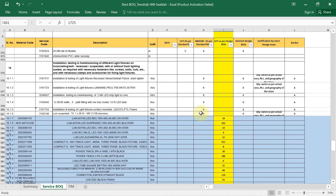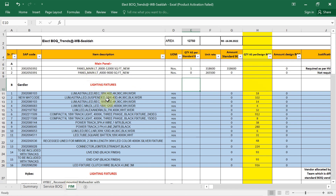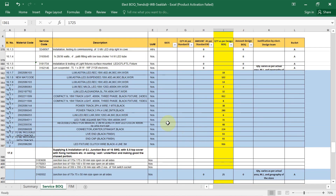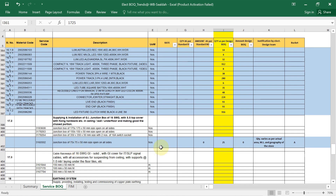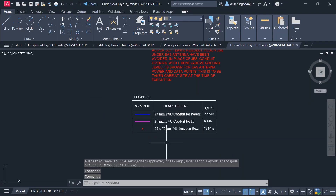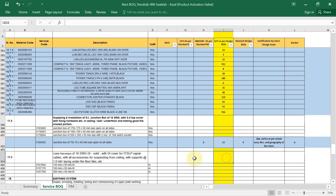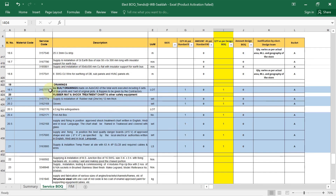Finally, for lighting fixtures: we have already calculated the quantities. In the description, each fixture type name and quantity is listed — fill that same detail here. For junction boxes, open the conduit layout — the junction box count is 23 above. The BOQ shows 25, so write 23. Also fill in as-built drawing sets (6 sets of blueprints).